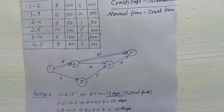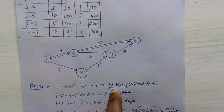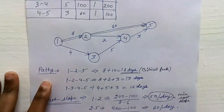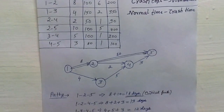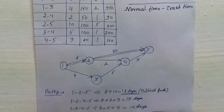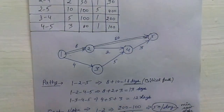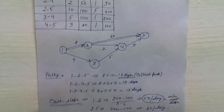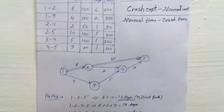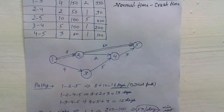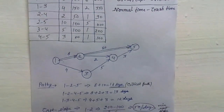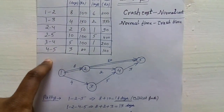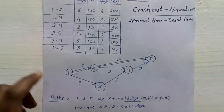Remember that you can only crash those activities which are on the critical path. Be clear — you have to only crash the critical activities. In books sometimes they calculate the cost slope for all activities, but you don't need to do that. Only calculate the cost slope for those activities which lie on the critical path.